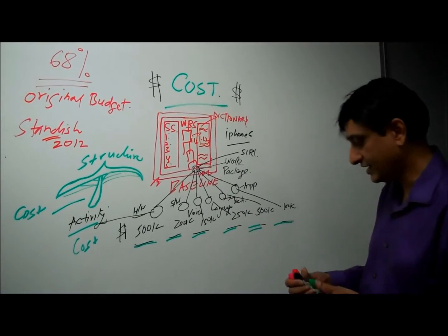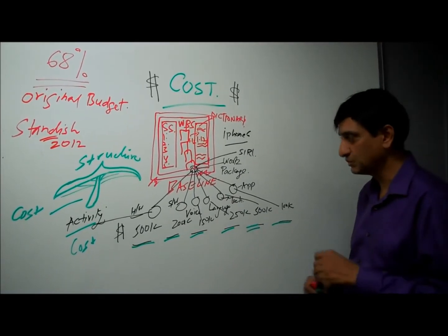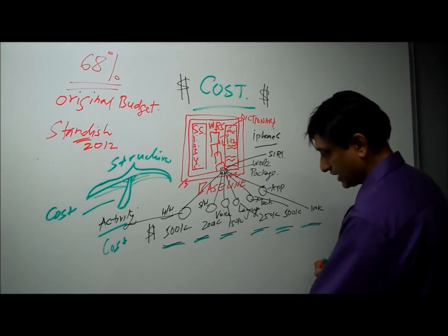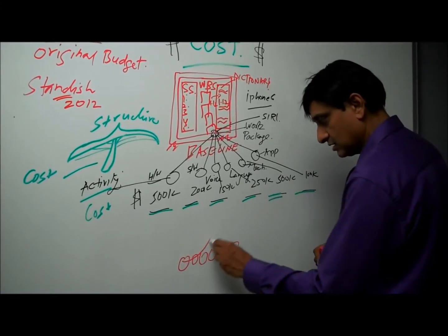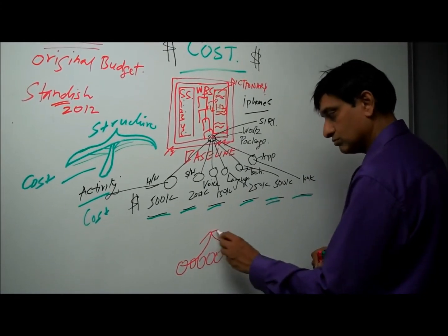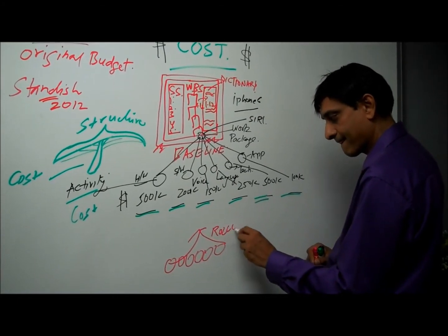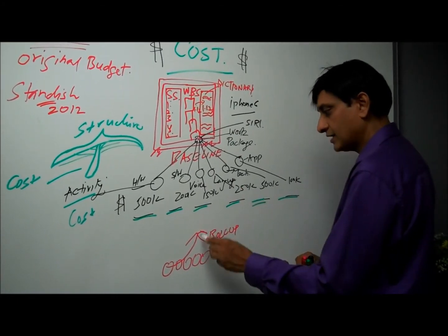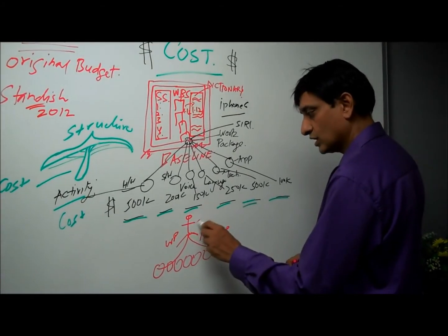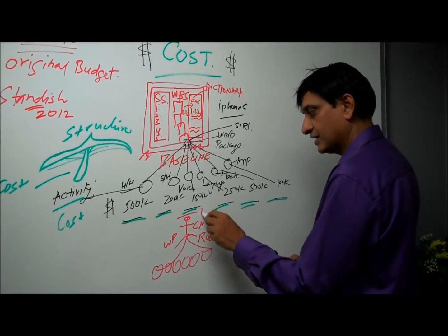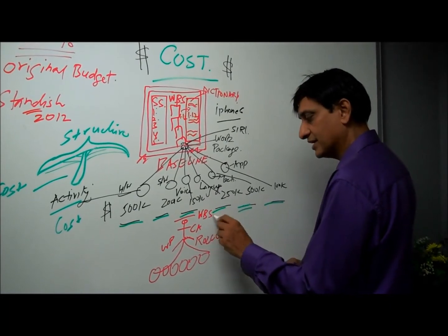Once we are done with that, the third step comes into the picture, and that is we take all the activity costs together and start rolling up, till we get the work package level, and the control account level, until finally we get the WBS deliverable.